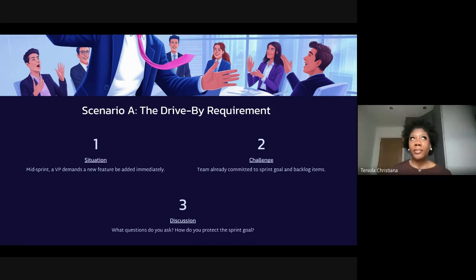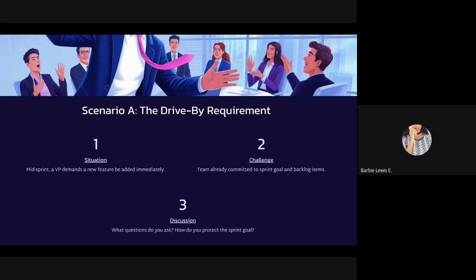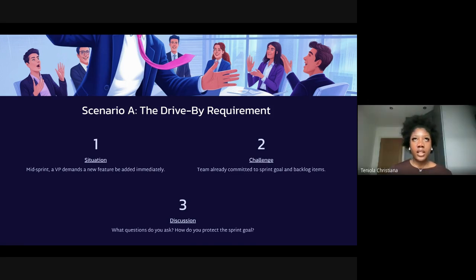All of those things are basically data that you want to be able to present. It's not about saying no, it's about saying, these are the two features side by side. If we do this, we're not having this. If we do this, we're not having that. This is what customers say about this one. Usually you'd have that data, but if you don't, this is where we've rated this on the priority initially. This is where it falls on the roadmap. Which trade-off do you want to make? Do you know what I mean? That's a good way to get people to see perspective when it comes to building features.